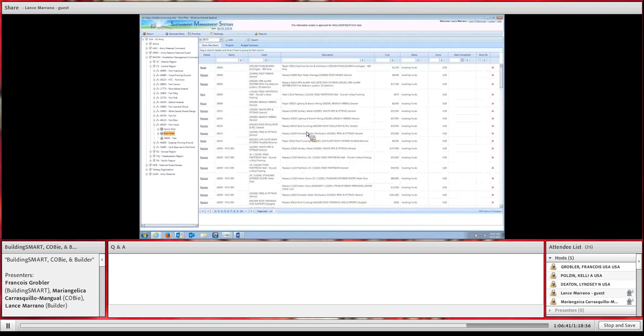So also on the Mercy site, another group, another project that some people may have heard about or be working with is the SRM Wizard, which is taking this data from Builder, and we're then giving it to the maintenance management system of the end user. In one example, Defense Logistics Agency, they're racking and stacking all of their requirements together across not just buildings but other things, deciding when they're going to schedule or program that money, and then giving that list back to the Corps, who then takes the same list of details from Builder and that information from the DLA to then go out and create fully fundable estimates.